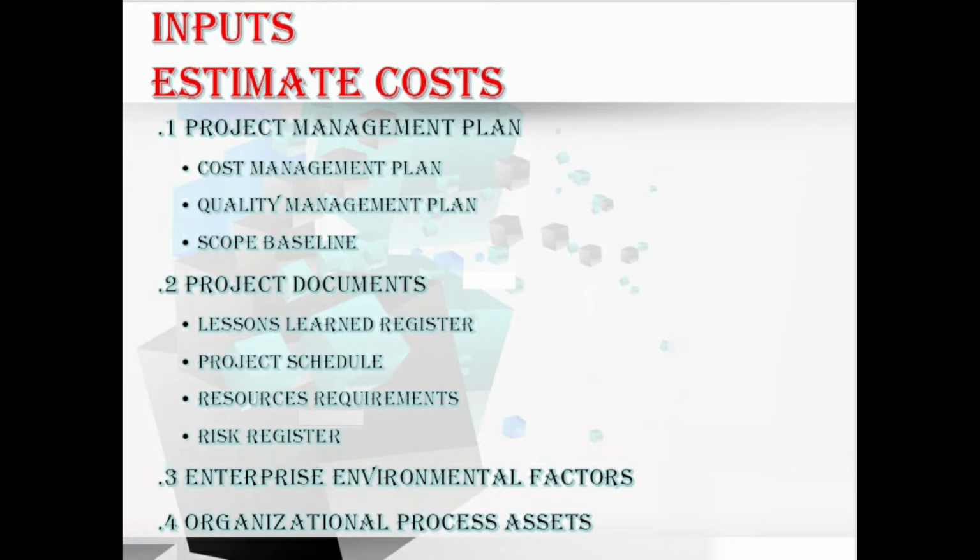Moving to the next, the scope baseline. As you know, scope baseline is the WBS, WBS dictionary and the project scope statement. To create a cost estimate, you need to know the details of what project and product scope you are estimating, which includes knowing what is out of scope and what cost constraints have been placed on the project scope. Okay, this is about the project management plan input.